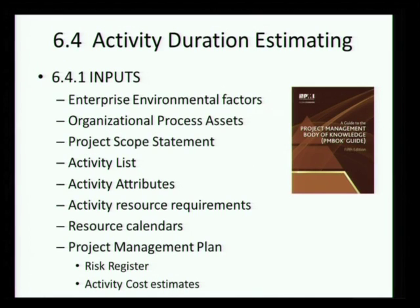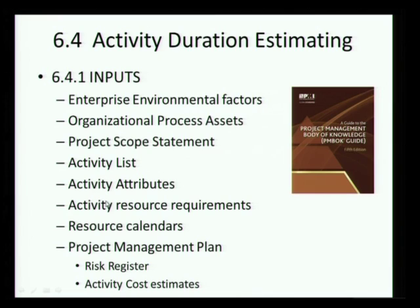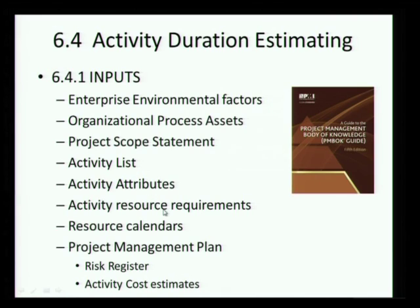Going back to the PMI standard for project management, they have a section on activity duration estimation with inputs, tools and techniques, and outputs. The inputs include enterprise environmental factors, organizational process assets, project scope statement, activity list, activity attributes, activity resource requirements, resource calendars, and the project management plan. This gives a broad idea of the various aspects that go into estimating duration, and we will look at a subset of this.